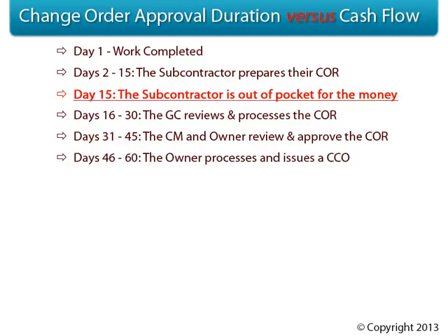A signature on the bottom line of a change order request doesn't mean we can bill for the costs. I know, it sounds ridiculous, but we do have to go through the accounting formalities and pageantries that have become accustomed throughout our industry. Until an owner issues an official contract change order, which is a legal document that formally adds the value of the change order request to the prime contract agreement, the work cannot be billed for.